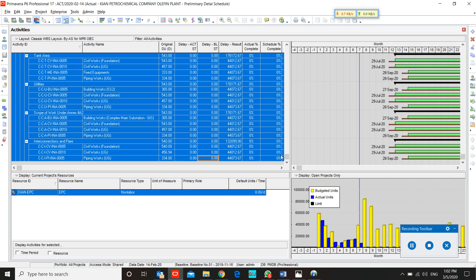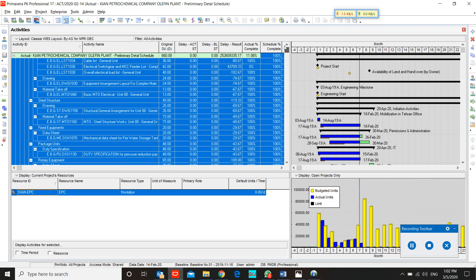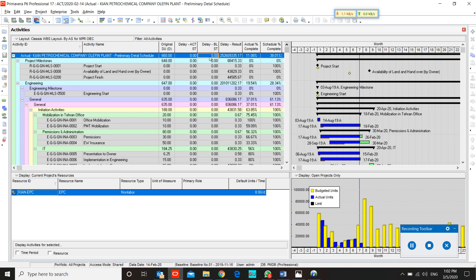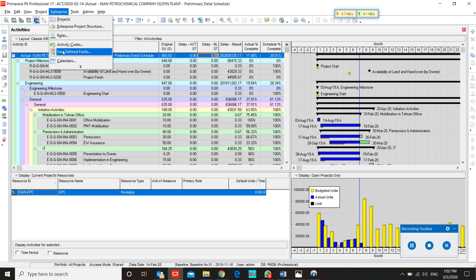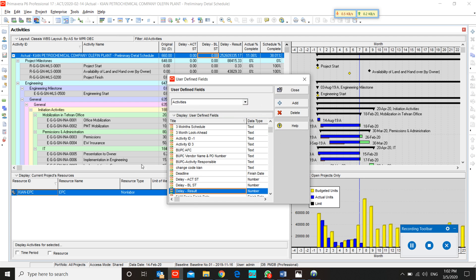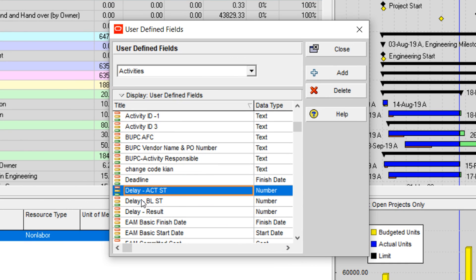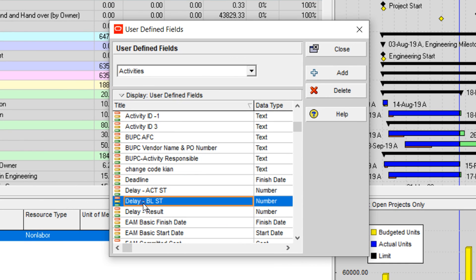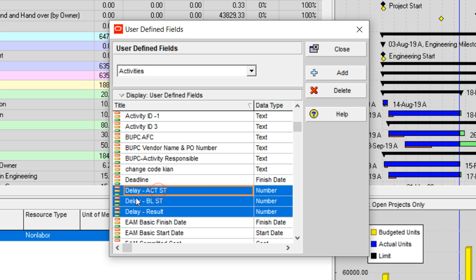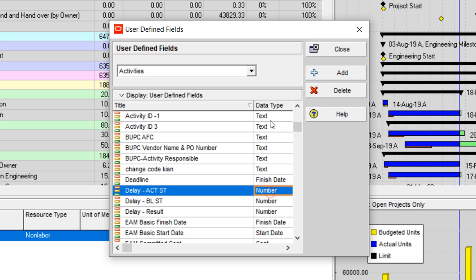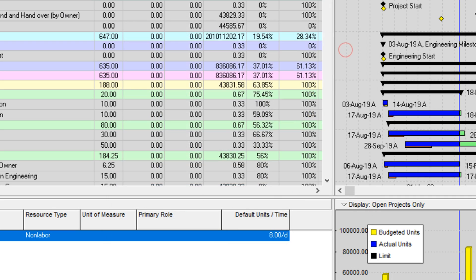In combination of global change and P6 filter, I prepared three user defined fields and named them: delay actual start, delay baseline start, and delay result. I named all of them with 'delay' because it's easiest for sorting. I changed the data type to number. This is a very easy filter and very easy global change.